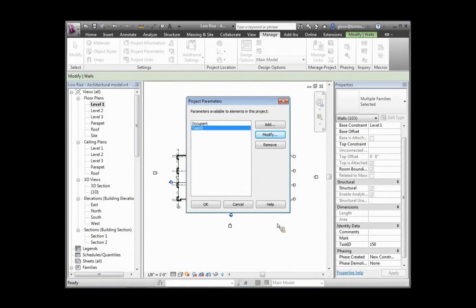So to get the idea of assigning these task IDs, the big thing to carry with this is shared parameters. Go ahead and add things. I use it for task IDs, but use it for anything you need to extend. It's a super database of elements. Extend that database with any information, whether it's when it got delivered, when it got ordered, where it's stored on site, who's the last person who installed it, whatever it is. Store information and really use that database for all it's worth.